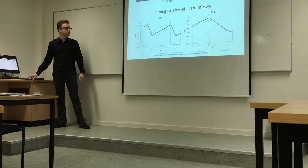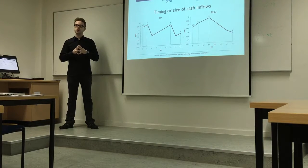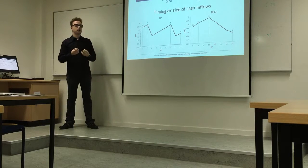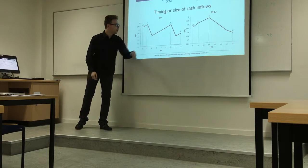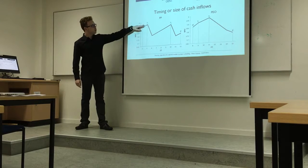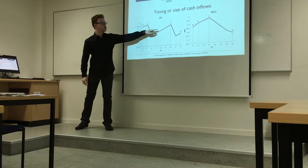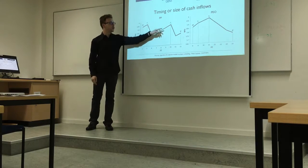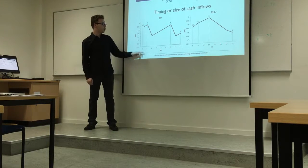Recall from the previous chapter that the NPV curve of each activity was either strictly increasing or strictly decreasing depending on its cash flow sign. But when working with predetermined payment times — say at times 5 and 10 — we get a typical sawtooth pattern. For a single activity, the optimal finish time would be to schedule it at time 5, and it would never be beneficial to delay to the second peak since that peak is actually slightly lower.